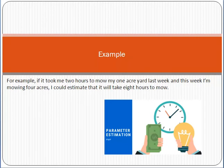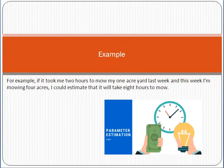Similarly, for example, last year it took you 1 hour to develop 1 database. So now, if there are 4 databases, you can complete them in 4 hours. This is the concept of parametric estimation, in which we do estimations in terms of time and cost, based on some parameters, based on some unit cost.